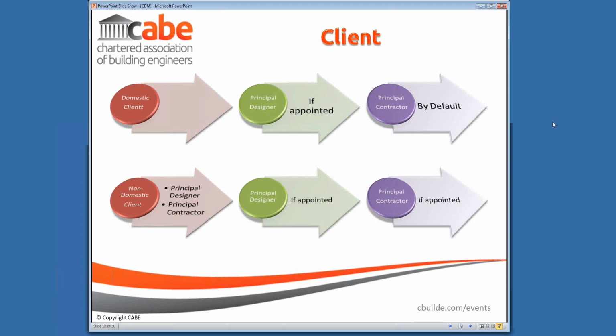Got a question of, if there's less than 20 on site but the project is longer than 30 days, would registration be required? How about that? If it's less than 20 on site and it goes on for more than 30 days, no. The issue is that it's 30 days and 20 on site. So no, under the current proposals, no.